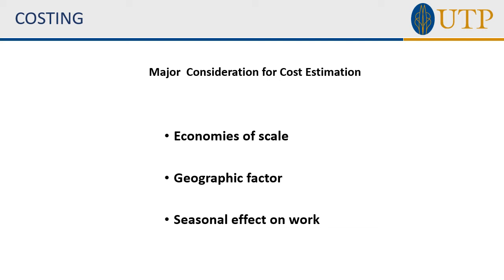And the last point is the seasonal effect on work. Since the site is located in the east coast area of Malaysia, it is exposed to the monsoon season at the end of the year. This can cause delays in work progress, which will contribute to more cost consumption.